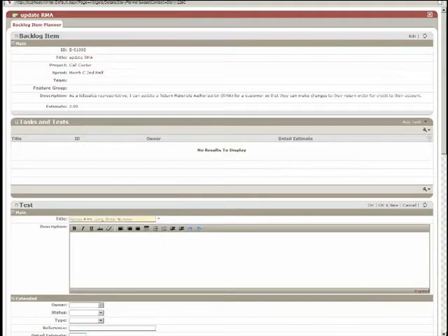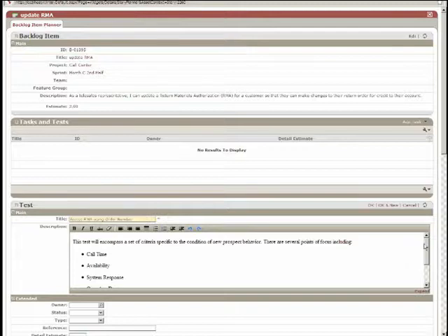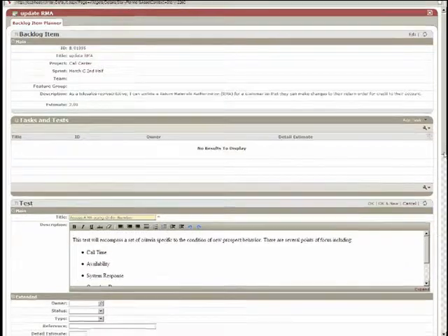And while the team is talking, whoever is driving that day can document any kind of discussions that are going on. So we want to give as much information to QA as possible. We might know who's going to do this test. We might not. But we also want to give a detailed estimate of how long, on average, it should take to complete this test, regardless of who did it. So let's say the team says, well, this is about a 4-hour test. Okay. So what else do we have to do?